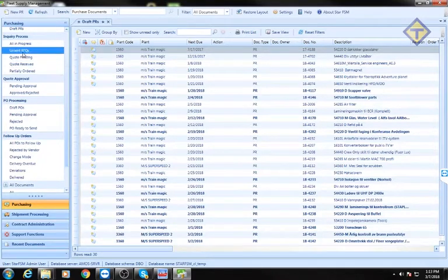That means when I change from the PR to the PO, it receives the status draft, and I can only change the status to order when someone from the office approves it: the superintendent, the manager, or the director, depending on the position and the amounts they can approve.